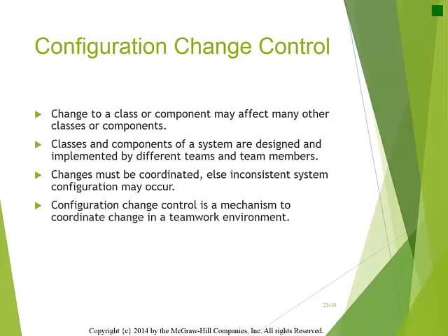2. Implementing the change proposal. The engineering change proposal is reviewed by a configuration change control board, CCCB. The board consists of representatives from different parties, including representatives from the developers of the components that will be changed.